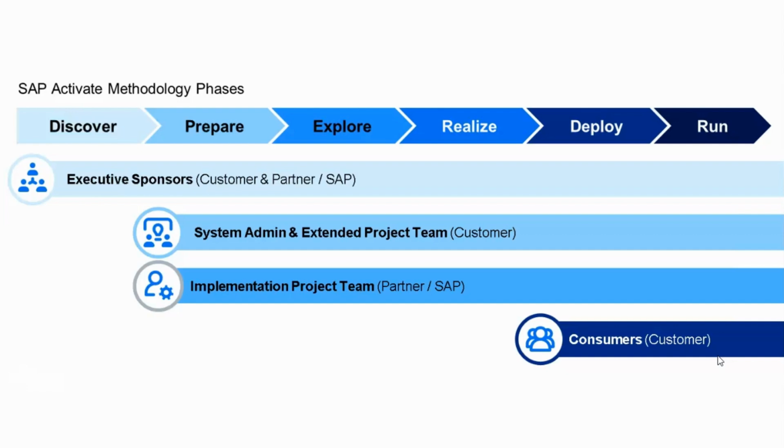So experts representing various business roles in each line of business from the customer organization are now added to the extended project team to participate in the fit to standard workshops. During the workshops, partners or the SAP LOB experts demonstrate each business process chosen in the digital discovery assessment from start to finish in the SAP S/4HANA Cloud Starter system.